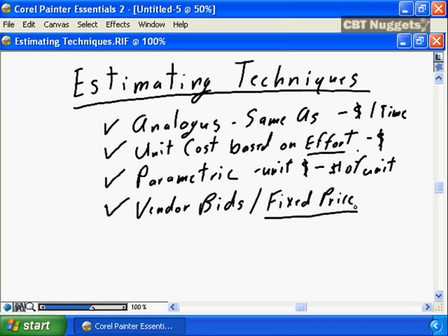There is no one right strategy for developing the cost estimate for each element of your work breakdown structure. The analogous may work well for some of your work breakdown structure elements. Others that are pure team member based, unit of effort by team member times cost, direct and indirect cost for the team member, will develop the cost for some components.